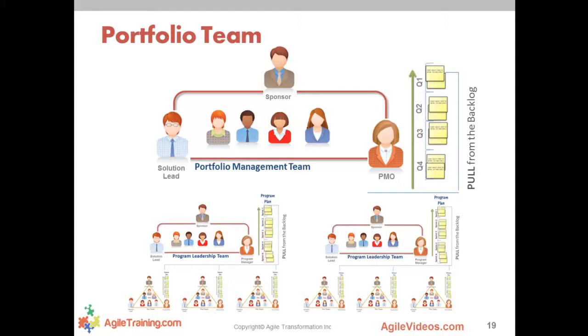And some of you may say, well, I don't need to do that. I've got my priority list and it's clear within my own portfolio team. I don't need to work with the other portfolio teams. Okay, sure, I'll give you that if you don't have to use the same resources. If you're fighting around the same IT resources or whatever resources, if you're pulling from each other, then we do need to know what is number one priority. Is it your project or that project? If you've got stable teams that are completely dedicated only to your portfolio, then yeah, okay, great. Your number one priority is going to get done and you're not going to have to worry about some of the other teams. In all cases, having an enterprise portfolio management team is really important because every organization does need to know what is truly number 1, 2, and 3.